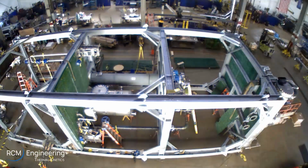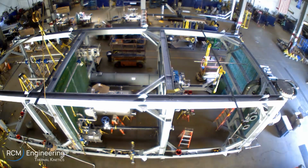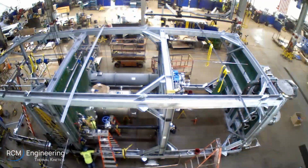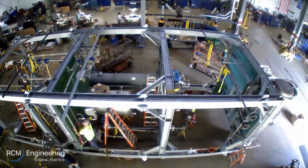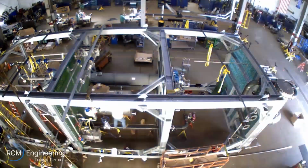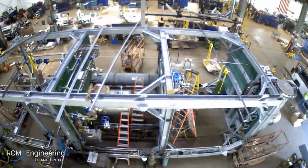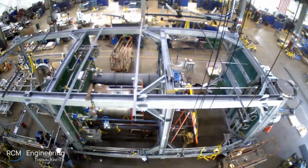The modular system design allows the end user to plan for tie point requirements prior to receiving the system. This advanced work simplifies the installation process to an equipment placement phase, followed by piping, utility, and electrical tie-ins. The other installation benefit is that the end user is able to plan exact timing for expensive crane and lifting equipment and scheduling. When you are looking at ways to de-risk your project, modular systems offer many benefits.